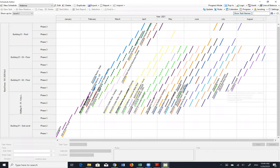I just explained to you why the system has this space empty. He tries to follow that those activities, in this case interior doors, are not done in parallel, because he wants to have one crew doing the same or quite similar amount of work every week. But since those activities, carpet and interior doors, are not labor intensive, we can easily tell the system that we would like to speed up that process because we don't want to lose two additional weeks.